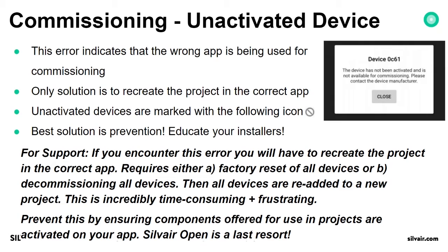And when you have these devices on site and you haven't communicated your desire for a different application, it might be very difficult to do it on site with physical devices delivered from the factory. So always talk to your partners and companies that deliver your devices to make sure that these devices will work in the environment you choose.